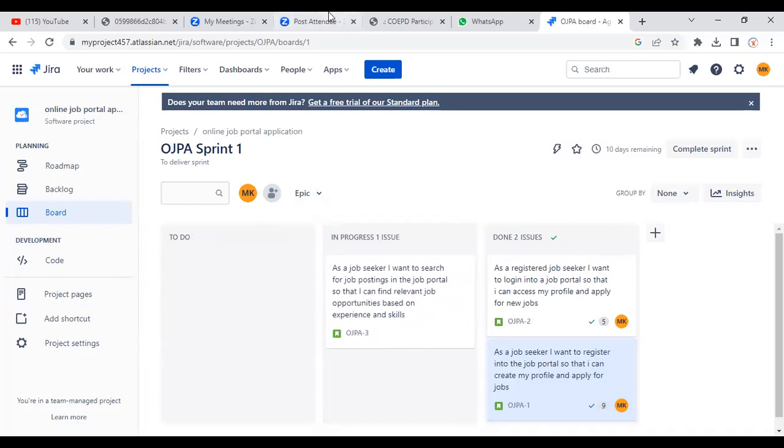Yes. As you mentioned earlier, this will be done by the Scrum Master, right? But sometimes when we get the requirements, you mentioned we don't have to do anything apart from tracking this, right? But in the user stories, even we have to give the requirements, right? No. See, initially the product owner has to gather all the requirements into the product backlog. In the sprint planning meeting, we all prioritize the requirements there. After that, in the sprint planning meeting, the development team is also involved. At that time, the team will decide who will work on the particular user story.